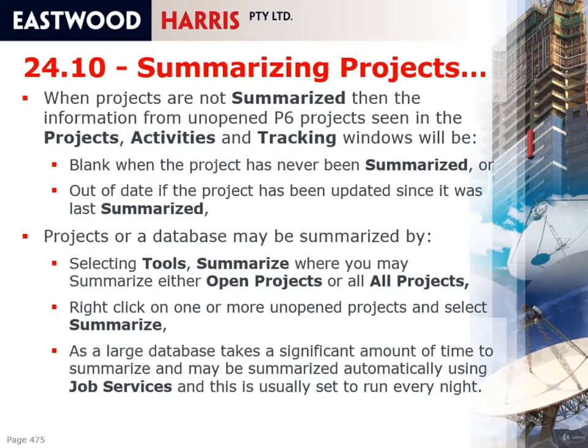So what happens when you summarize projects is the data from the activities is copied into what's called the summary tables, that are then read by the Projects window, the Tracking window, and when you're viewing histograms and tables from resources assigned to unopened projects.